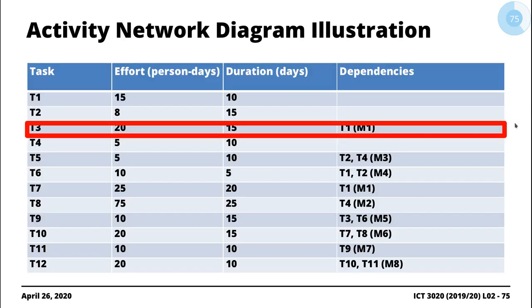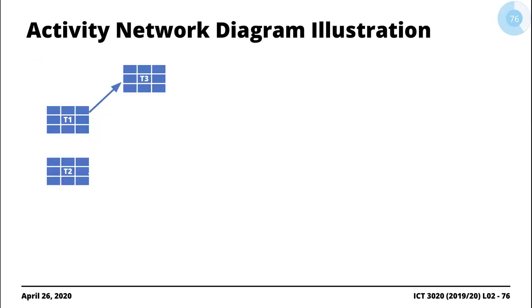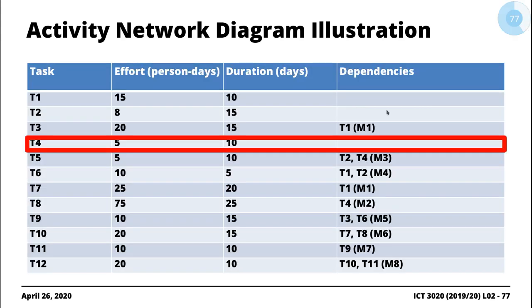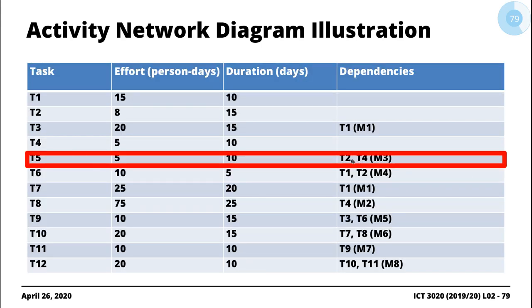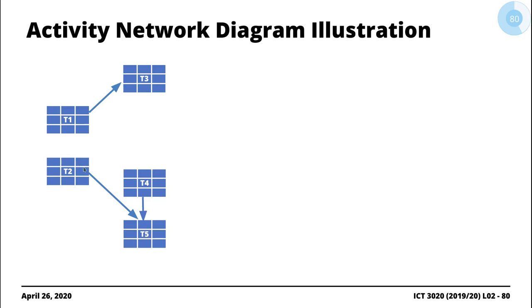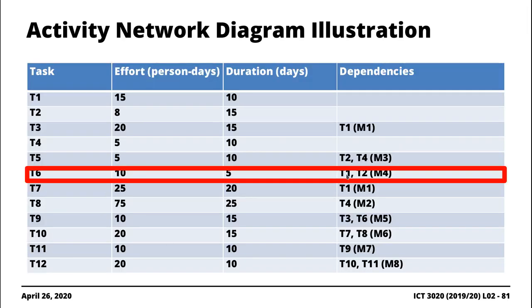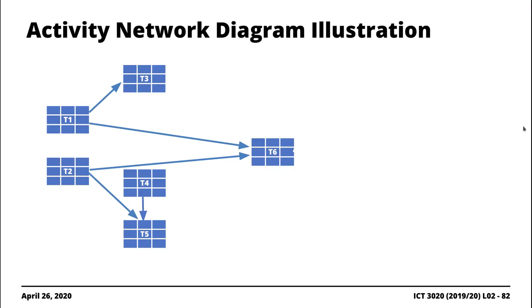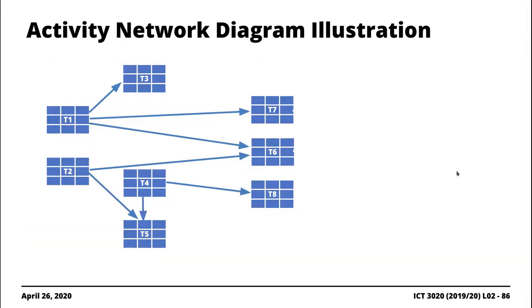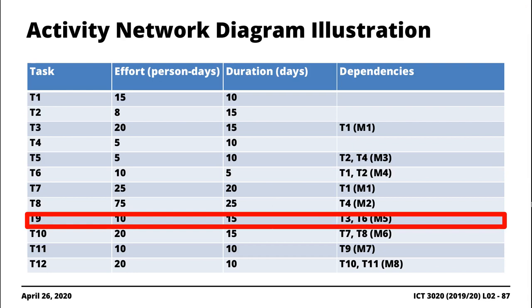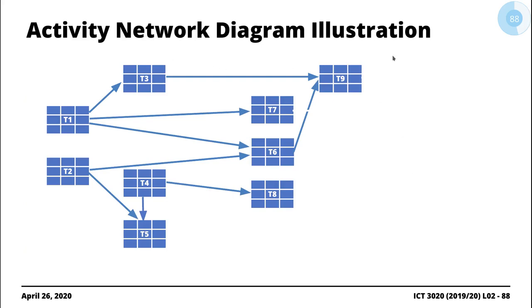Task three has a dependence on task one, so we draw an arrow originating from T1 going to T3. Task four has no dependencies. Task five is dependent on T2 and T4, so we draw arrows from T2 and T4 going into T5. Task six has dependencies on T1 and T2. Task seven is dependent on T1, with an arrow pointing to T7. T8 has a dependence on T4, with an arrow from T4 to T8. T9 has a dependence on T3 and T6, so arrows from T3 and T6 go to T9.